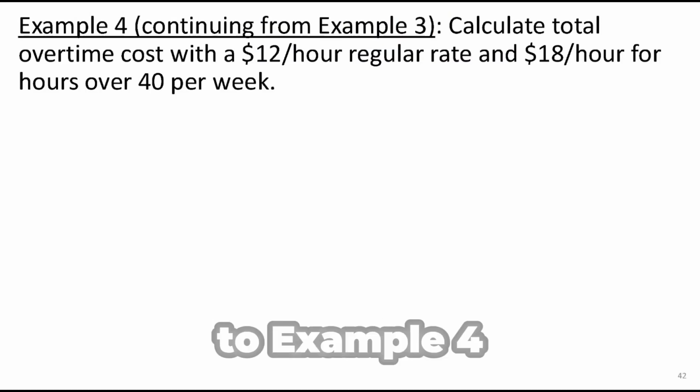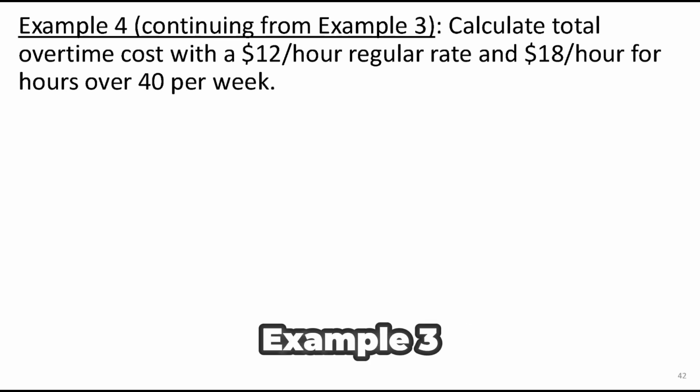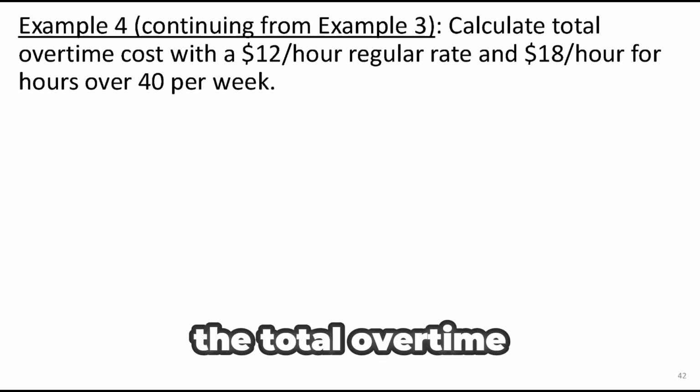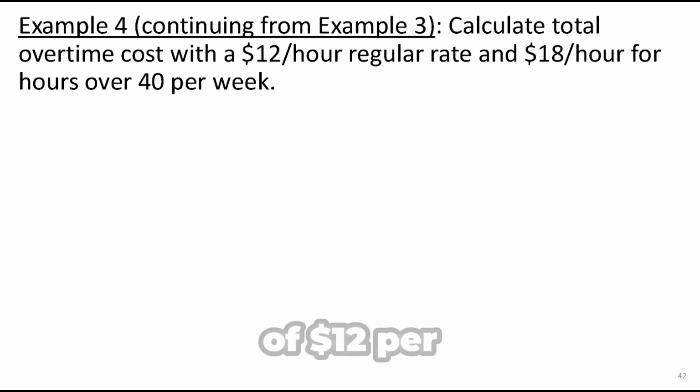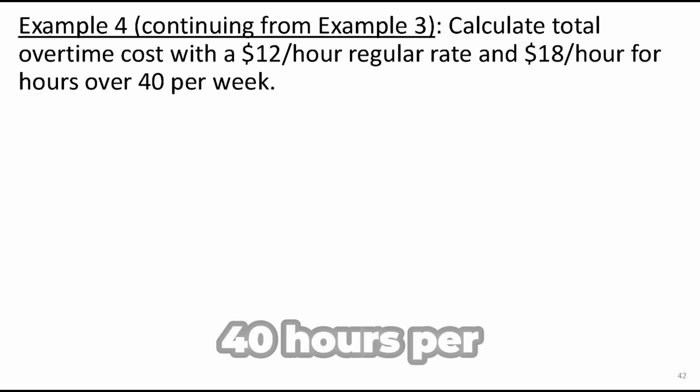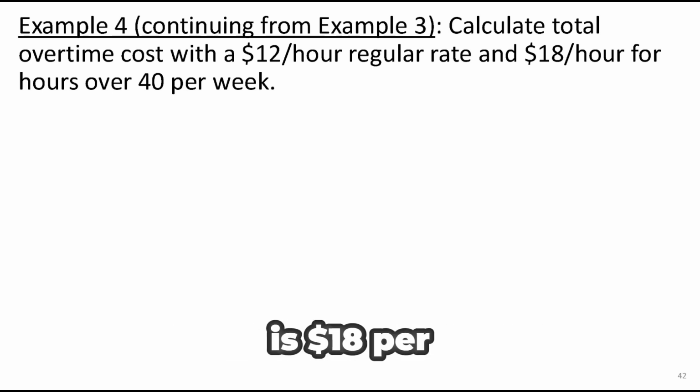Let's apply this to example 4. This continues from example 3. Now, let's calculate the total overtime cost. We have a regular labor rate of $12 per hour, and for any hours worked over 40 hours per week, the overtime rate is $18 per hour.